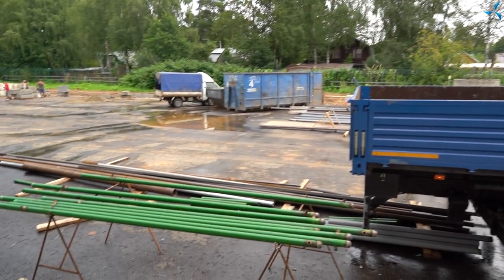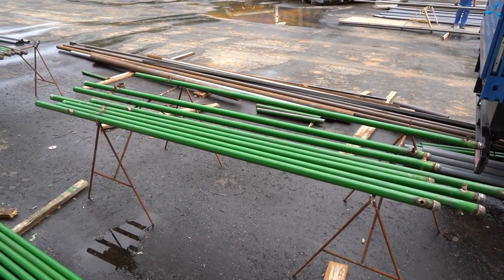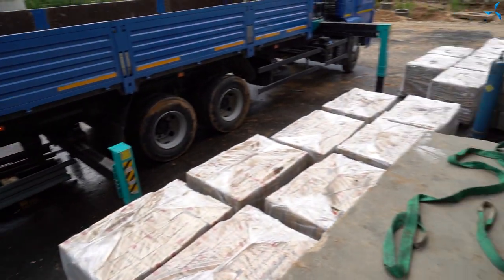We have now introduced changes into the architecture solution. We will need to introduce some more changes because we are constantly improving the project and we are changing some things. For example, a pipe with water should be marked with green according to the project, but we were not happy with it. We look at where the standard allows that. For example, if you do internal finishing, you can use a different color. But where there are connection points, you need to mark the color and then you mark it every 10 meters. So we will remake it, and it's just a small portion of it. All of it will be remade. Changes will be introduced. It will be improved.